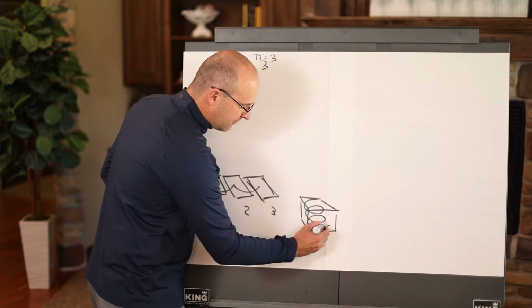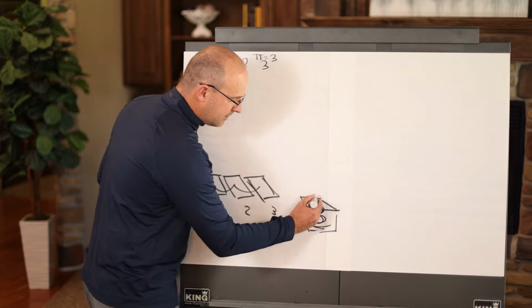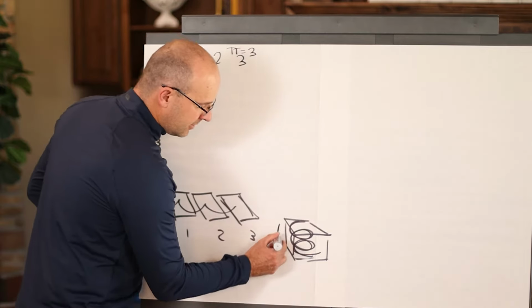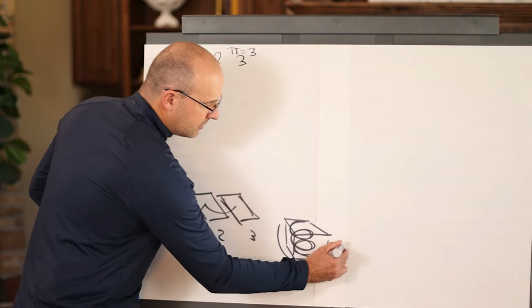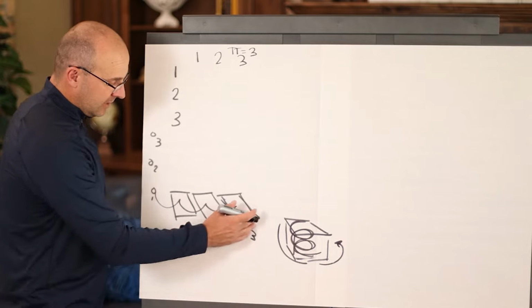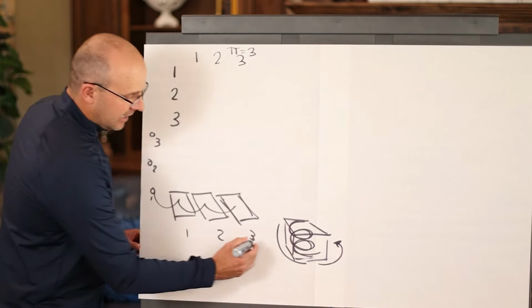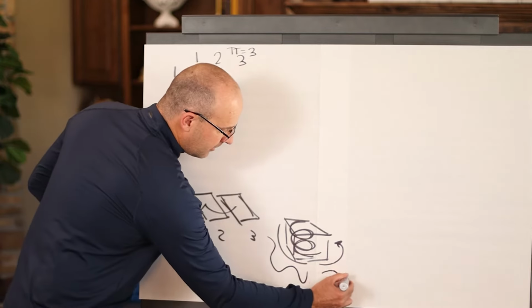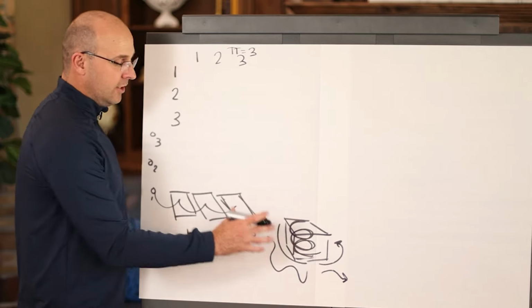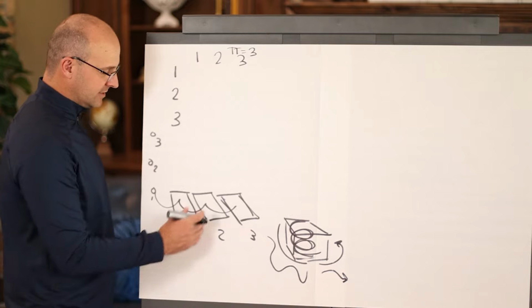Your interiors may follow that same path with zones and trades, maybe even the same zones. Your exterior may go around the building, maybe east, north, west, south, and it will have its own zones and trades. And then your site work may go around and sequence differently and have its own zones and trades. So a building will have multiple phases, but every phase has zones and trades.